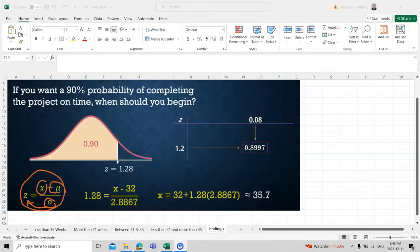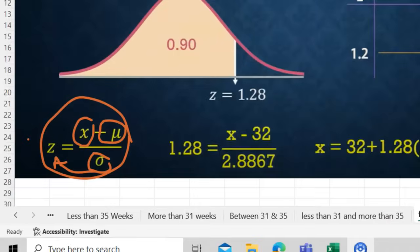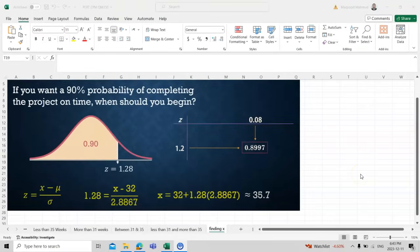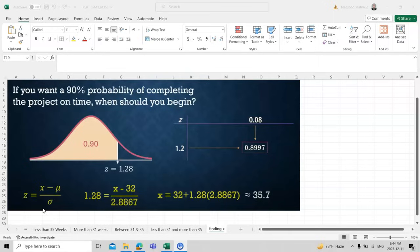Solving the rearranged equation gives x = 32 + (1.208 × 2.8867), which equals approximately 35.7 weeks, so we would need about 36 weeks in total. This concludes the chapter covering how to find the critical path, expected time, standard deviation, and how to use the z-distribution to answer probability-based project scheduling questions.